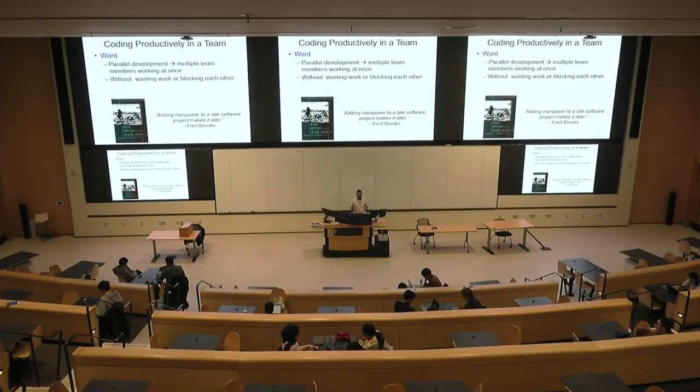So why does this happen? It actually happens a lot in software. It's not like building a house or shoveling snow, where if you add more people it's probably going to get faster. The problem in software projects is that there is a communication part. If you add more people who don't know anything about the project, you will probably waste the time of the people who already know, because they need to explain things to them, communicate with them and get them up to speed. That makes things go slower, and it will slow down even the people who know what is going on.